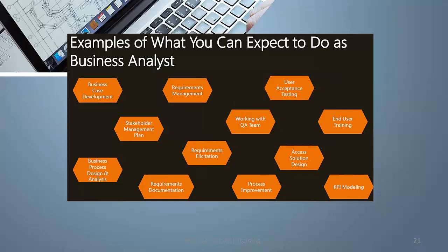Third is the cost involved. What is the cost of developing the software? When you have the benefit, the timeline, and the cost, you'll know exactly where you stand. Of course, the cost has to be less than the benefit that you are getting, and that's when you stop working on it if the benefit is less than the cost. If the cost is more, you say that this project is not feasible, and we are not going to go ahead with it.